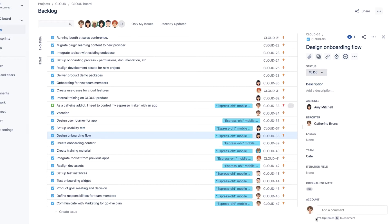Now my team members can start logging time to their issues, and I'll see all the hours worked by Team Cafe when I run Jira queries for the team's backlog.